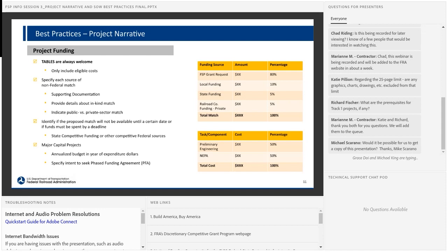Include funding commitment letters outlining funding agreements as attachments or in an appendix. Of course, funding commitments must be signed by an authorized representative of the entity providing a non-federal match. If federal funding is proposed as match, we'd like to see demonstration of the applicant's determination of eligibility for such use and the basis for that.